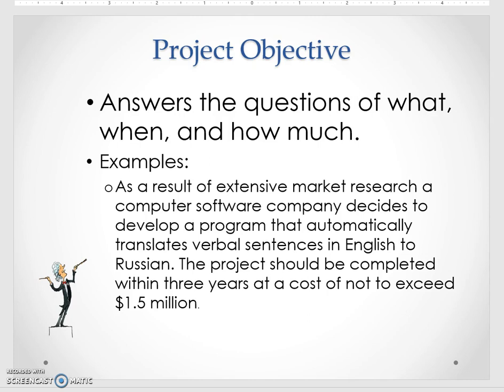Everything is being decided, and so at this point there's a lot of unknowns, so we might look for a date in the future. It's also very acceptable to say at a cost not to exceed, and put in a number that we know we won't go over, but that's still in the ballpark. We don't want to scare off any prospective sponsors or partners by having a dollar amount that's way too high.